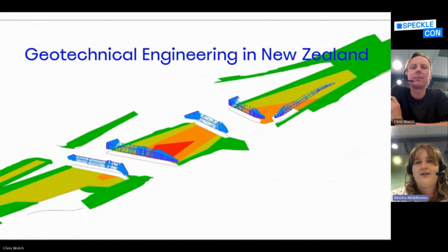This stage of the project, 1B1, was looking at a large volume of geotechnical work. In New Zealand, geotechnical engineering is full of complexities due to seismic activity, weak or variable ground conditions, and environmental considerations, among other things. Geotechnical work has also had large impacts on the visuals of the project. Due to this, it is not uncommon for designs to be changed considerably, leading to rework.